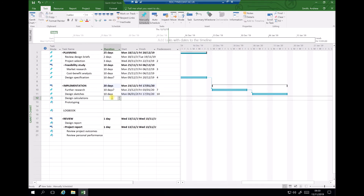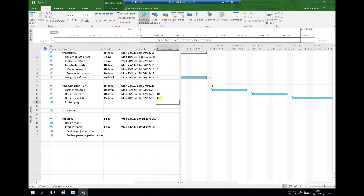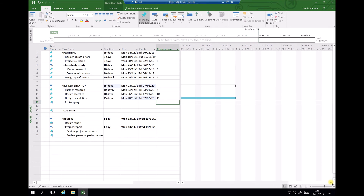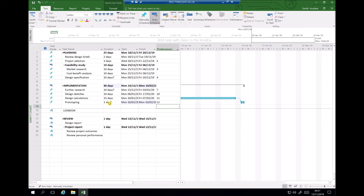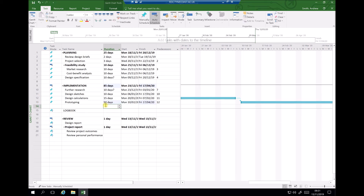I'm going to spend three weeks on design calculations, which can't start until design sketches are finished — so the predecessor for task twelve is task eleven. Prototyping can't start until design calculations are complete, giving task thirteen a predecessor of task twelve. Prototyping is being done by an external company with a lead time of ten weeks, so I need to set that to 50 working days. We can now see the duration of our implementation has greatly increased.